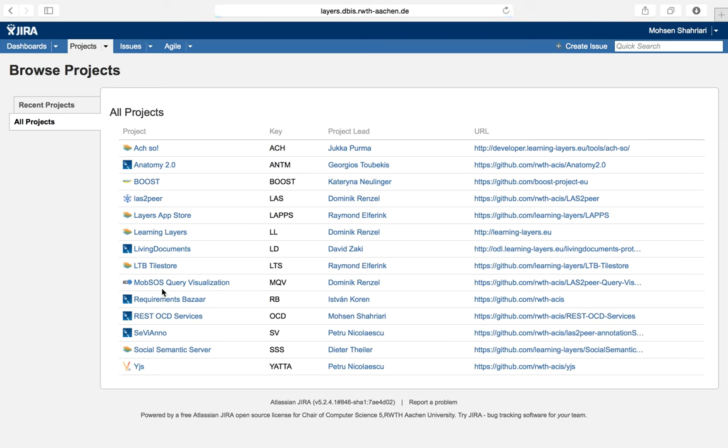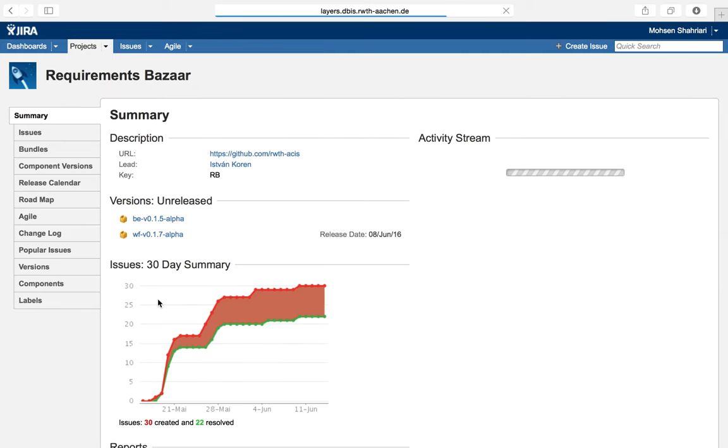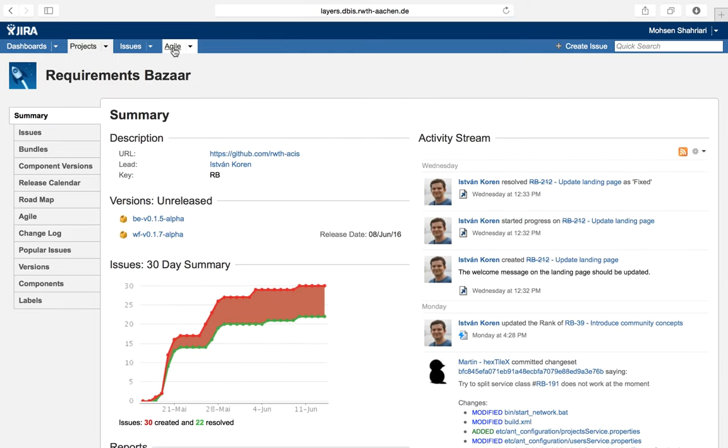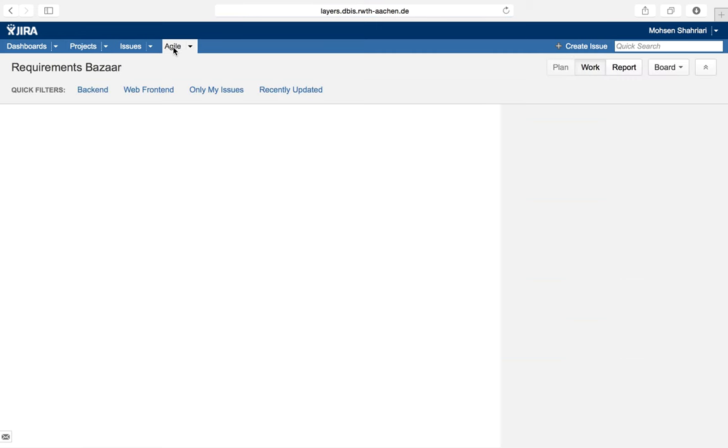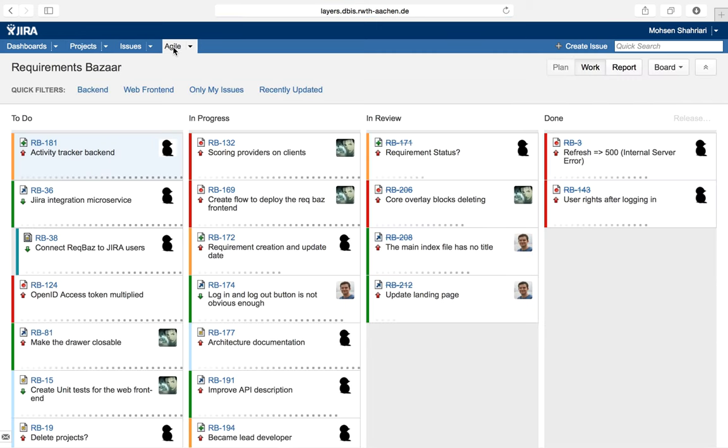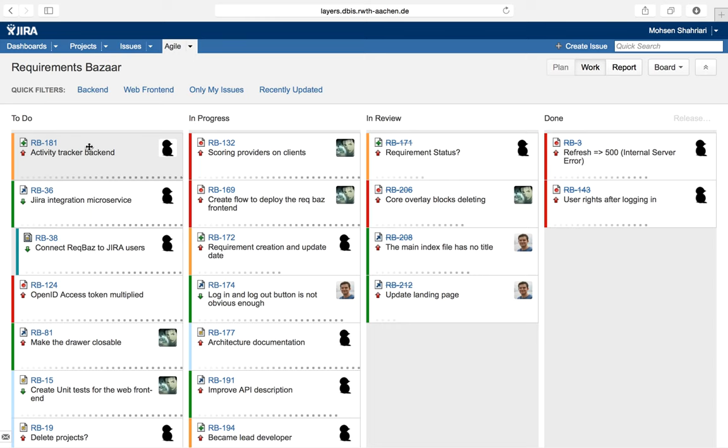We go to Requirement Bazaar. If we go to Agile, there exist some basic steps which can be defined for every software development project. This includes ToDo, InProgress, InReview and Done.